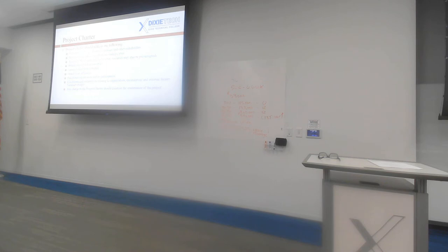It should talk about our business case, why we are doing the project from a justification point, strategically. What is it doing for us? Why are we doing this project? It needs to include the organization structure, the project manager, and the teams, whoever they might be, what it is that you're going to deliver, what the milestones are, who the stakeholders are in terms of what purse strings they control and how they control them. And so can they back out? Can they not back out as a contractual commitment? Those things need to be in the project charter.